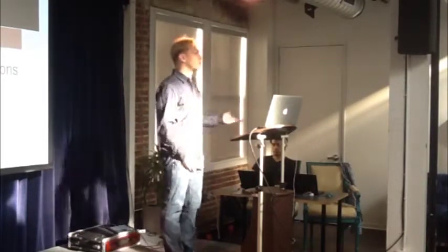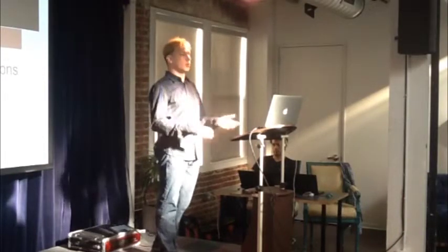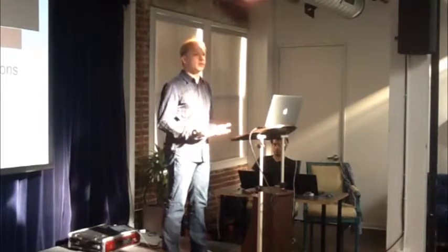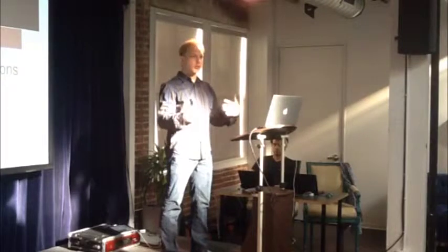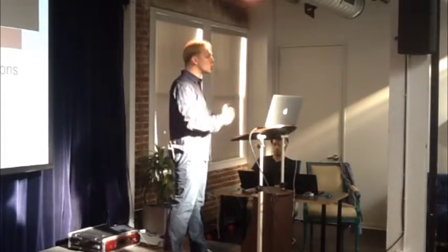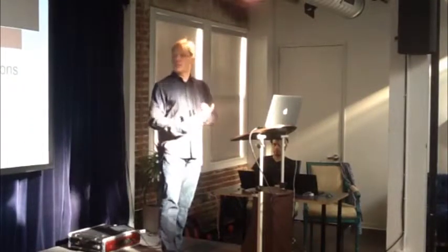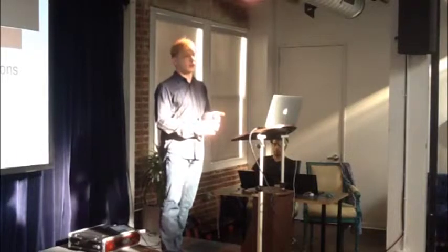The second one is added specifications. This is your classic scope creep. So as you are working with your product, your idea people will have new ideas. That's what idea people do, right? And especially, you can envision what a product's going to look like up front on paper, but once you start working with actual software, new things will occur to you. The second major way that new added specifications come in is people responding to user requests.